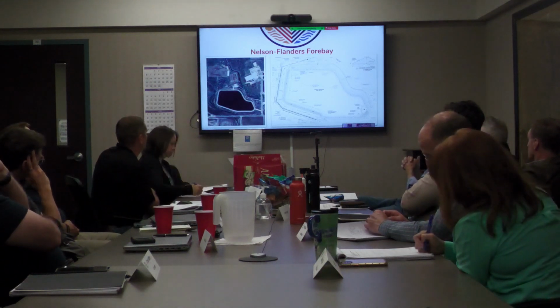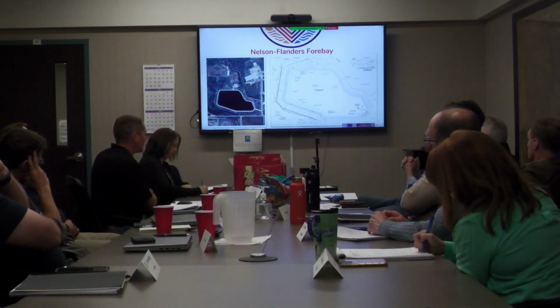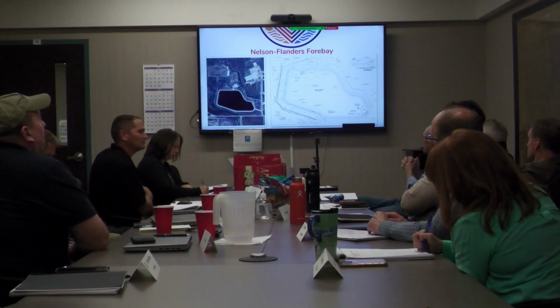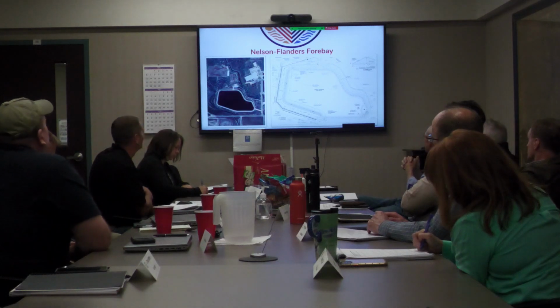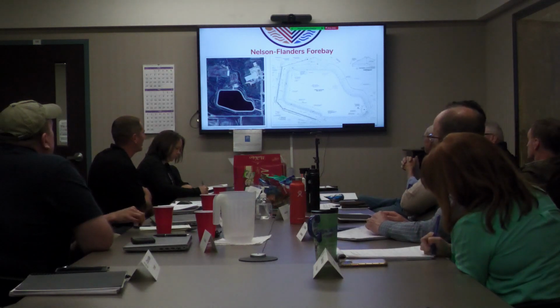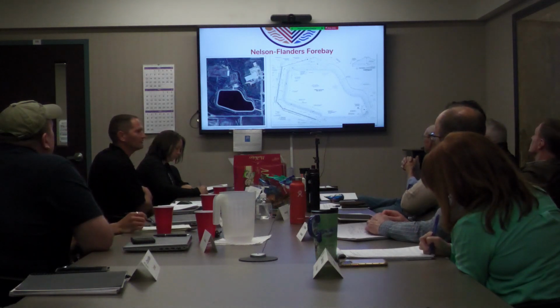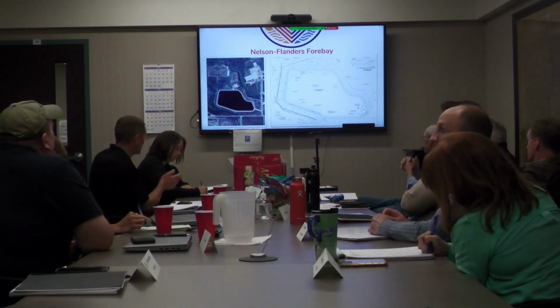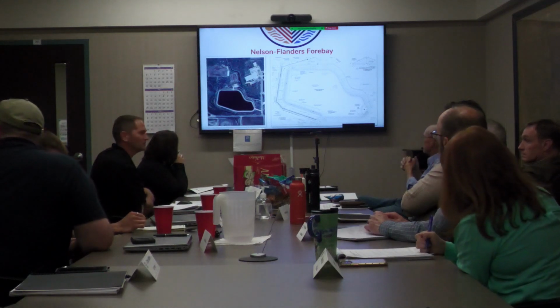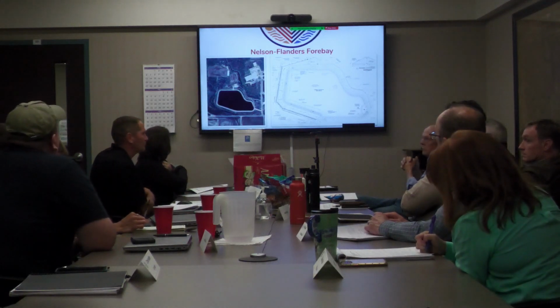So we're hoping to start construction in August, September, and it's about a 4 or 5 month project from what the engineer's estimating. So hopefully by the end of the year we can put it back online. Looking to start taking it down to dry it out here middle of June after the runoff period. And we're also going to be excavating out about 4 to 6 inches of sediment that's accumulated over the past 20 years in there.